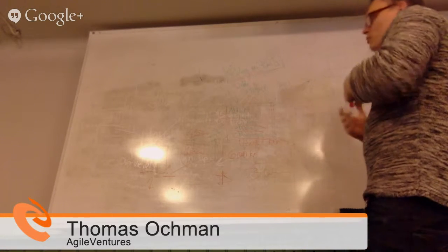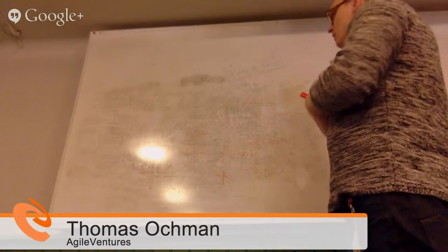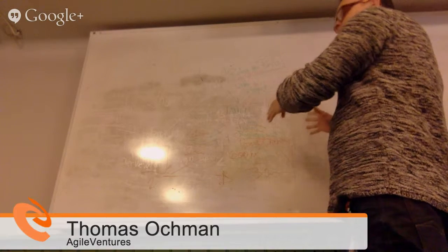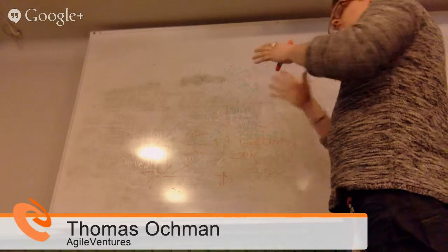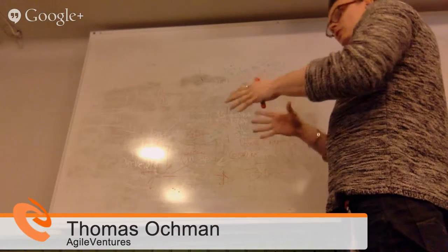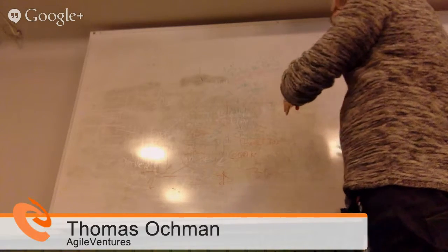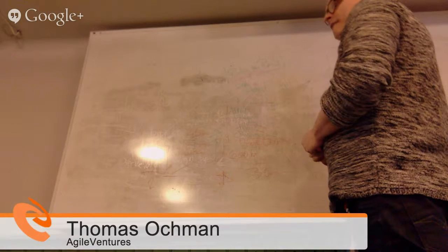month. Because since we are working in this agile approach to system development, we want to focus on the bare minimum of the functionality that you can accept as the business owner, and we want to deploy that as a ready-to-go application. And then we can build upon that, and iterate through sprints. What is your impression?